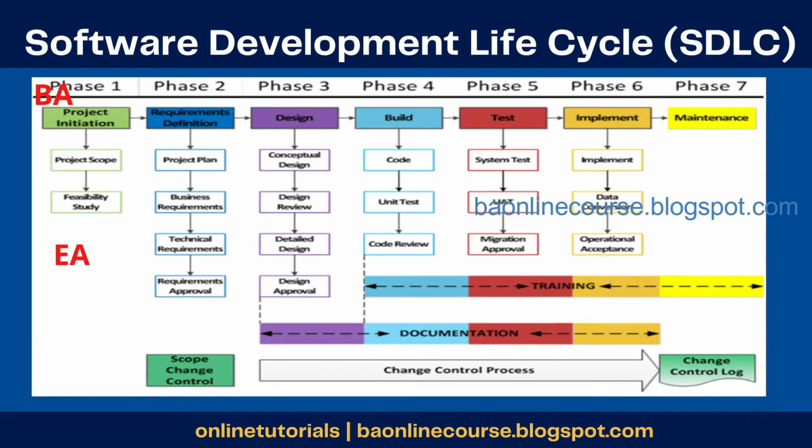Okay. Now, once the business case is approved by the senior management, that's when the project budgets are allocated. Which means the senior management is giving you $1 million and saying, okay, you go and start the project now. So that's where the project managers come in and the identification of the vendor is done. Then the teams are onboarded. Okay. So phase 1 is where the projects are identified. Then you'll figure out the high level scope of the project, and then the budgets are allocated. Okay. So that's phase 1. So usually a BA gets involved here.